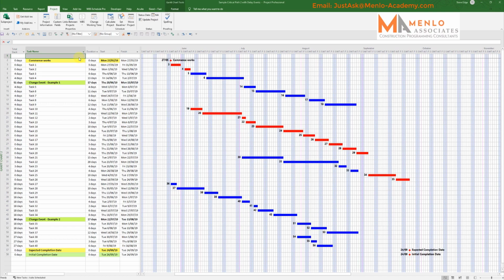The programme is the life story of the project. So anything that changes the story needs to be recorded in order to show the effect. The reason why is very simple. Change costs money, and if the project takes longer to complete, you increase both cost and risk. Cost of running the site and risk of not getting paid for it, plus the risk of having to pay penalties for a late finish.